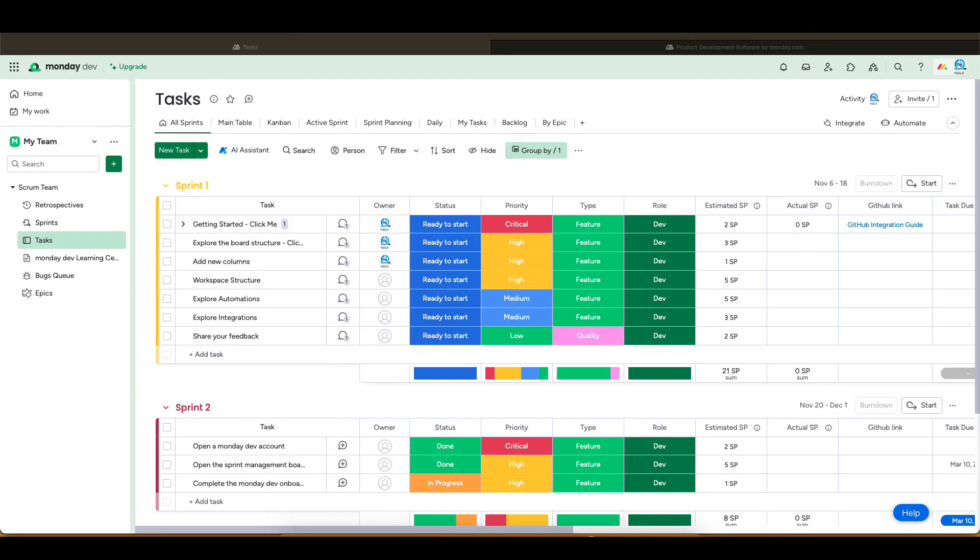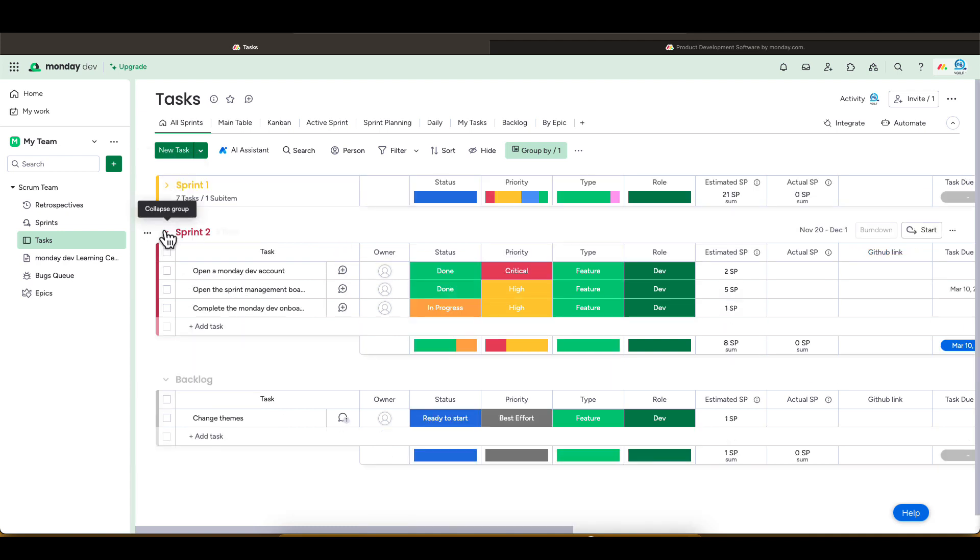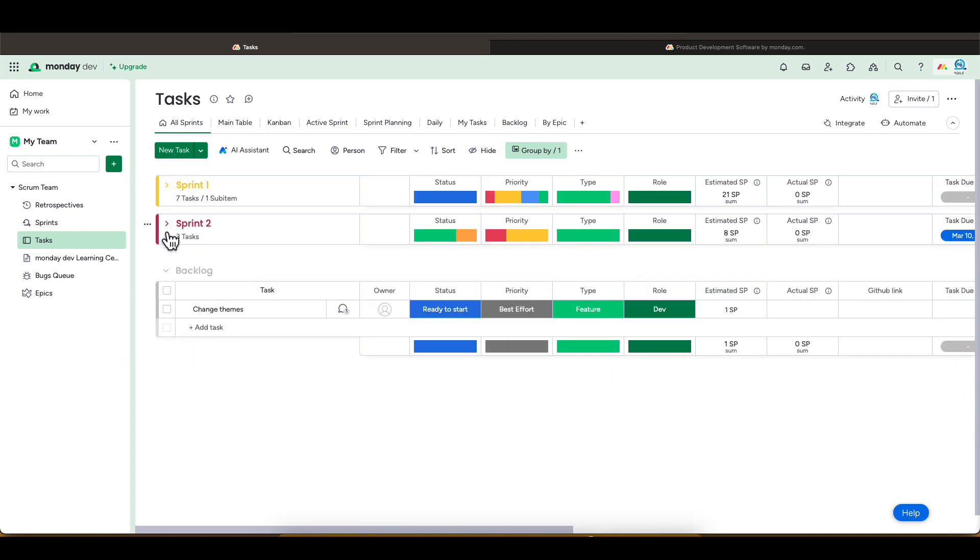The task board is your main board. This board will host your sprints and user stories. The sprints are listed as groups with the backlog at the bottom.